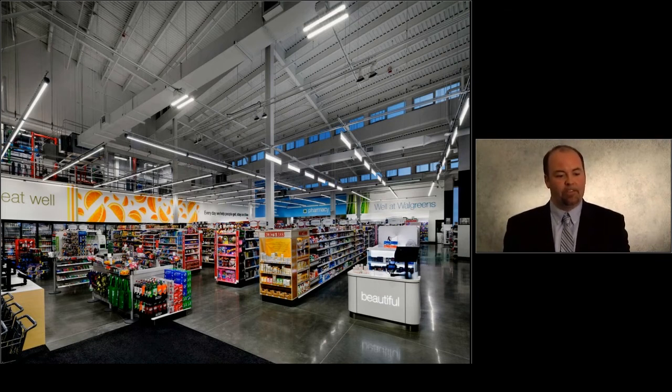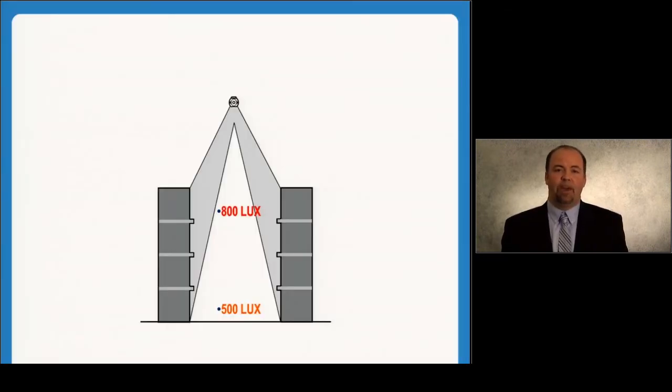You can also see here the lights in the space. This is just kind of a schematic example of what that light is doing. It has been working very well for us. We were extremely worried that the lighting levels wouldn't be sufficient. You can only do so many photometric plans before you have to actually install it, and it's turned out to work very, very well. One lesson that we learned is that we didn't share the numbers for the foot candle levels of the photometrics with anybody. We actually took our operations people, walked them through the space, and then adjusted the lighting up and down until they found a level that they were comfortable with.